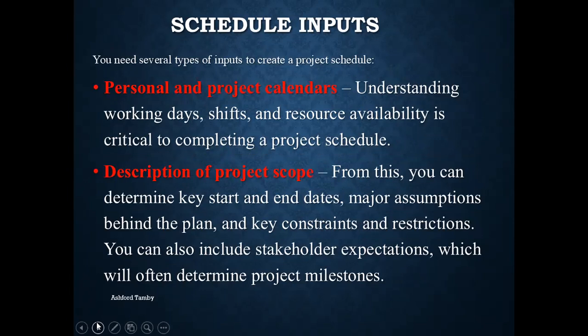And when we say understanding the inputs of your schedule, we're really talking about things that would affect the scheduling of your project. So we're talking about the personal and project calendars and understanding the working days. The shifts and resource availability are critical to completing a project schedule. And when we talk about working days,